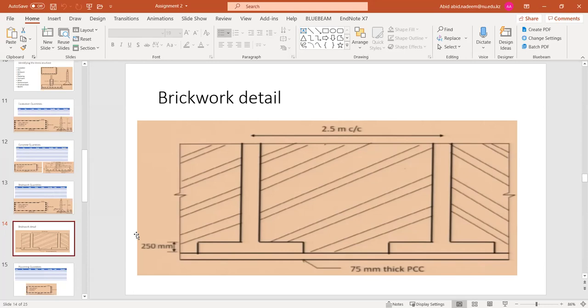we may agree that concrete pours, that means the column footing, the work on the column footing should be completed first. So although there is no logical constraint between them, therefore, after the concrete pouring, then the work on the column footings can start, okay? So this we have decided based on the physical constraints.